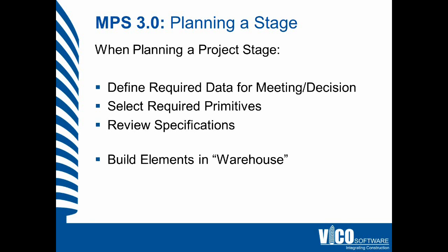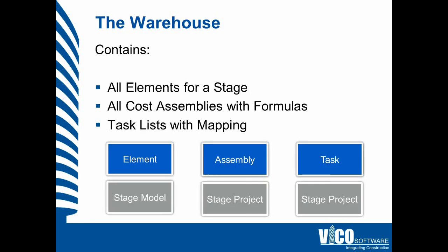Once you've done that, you define the elements for the project specifically. You can do that in what we call the warehouse, or the virtual construction warehouse — a separate model that contains samples of the elements you're going to use in that stage, along with cost data. The warehouse contains all of the elements for a stage and all of the cost assemblies with formulas, which allow you to predefine the connection to the building elements created in the stage model.